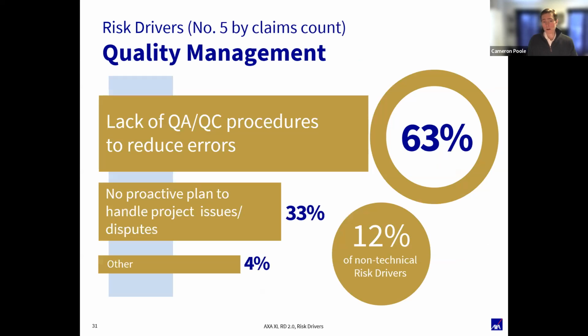All right. Quality control. The thing here, and this is different for every firm, and honestly for many projects, is having a procedure and sticking to it. So maybe your procedure is just before drawings go out, they always go by this principal's desk and they take the time to review it. Great. As long as you stick with that, that's your procedure. The difficulty there is when firms are busy, they start to fall down on doing the quality management. And that's where over the last couple of years, we started to see these claims tick up, with firms just being inundated with work.